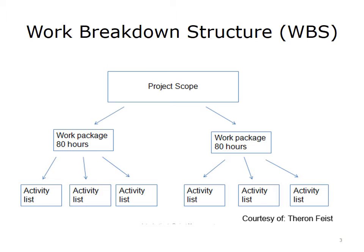The Work Breakdown Structure, or WBS, details activity lists that will help you identify project risks. You will develop these lists from your requirement analysis and scope statement, so if you have planned your project effectively, creating the list should be relatively simple. The WBS breaks the scope of your project into manageable chunks of work that are approximately 80 hours or less. The lowest level in your WBS is the work package level, and these work packages are broken down even further to create lists of activities.